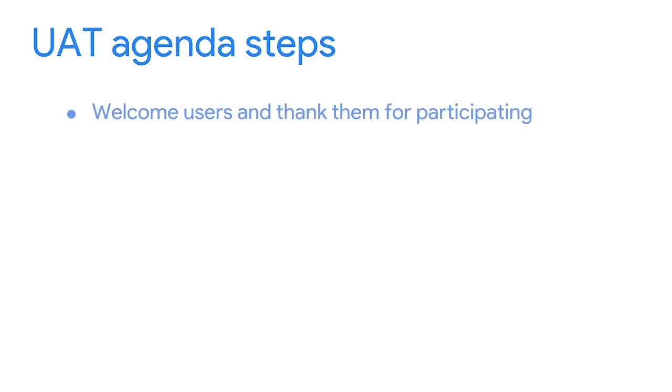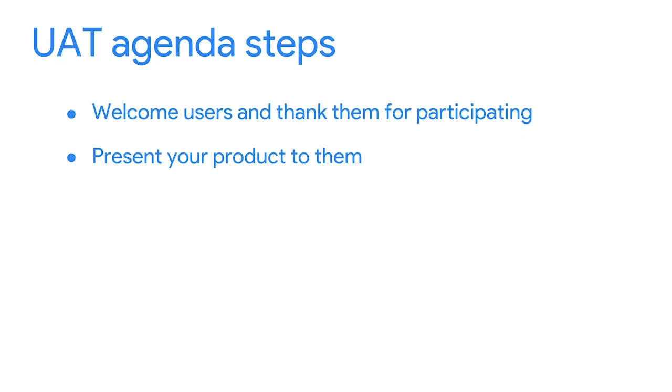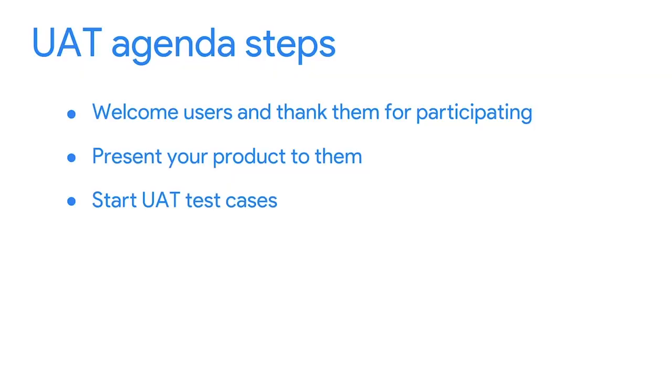In a typical UAT setting, you'll welcome your users and thank them for participating, then present the product to them — discussing testing guidelines and demonstrating how the product works. Next, you'll start your UAT test cases, taking your audience through critical user journeys. A critical user journey is the sequence of steps a user follows to accomplish tasks in your product. When presenting something you've built, you must give users a visual representation or mock-up of your product, or have them go through a demo — such as 3D models, digital blueprints, or samples. Your UAT demo should focus on a call to action.